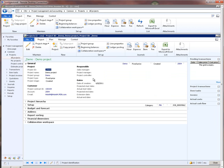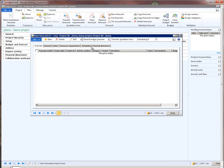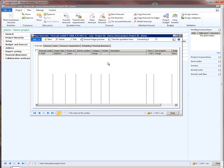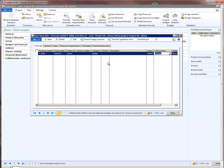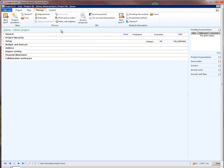So let me close this and click OK. This creates a new fixed price project for us. Let me put the project in process. Now let's go and forecast for this project. I am forecasting 100 hours of design work on this project. Then I close this forecast form. The next thing we do is define the milestones for this fixed price project in the on account transactions form, which can be accessed from the manage tab in the project details page.